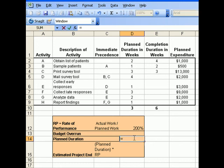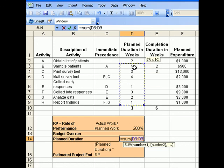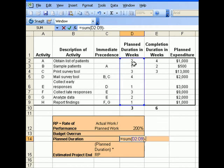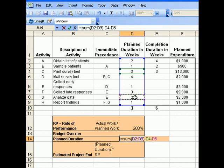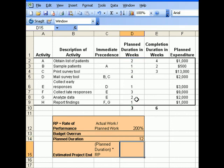We'll take the sum of all the number of weeks for these activities, and subtract activity C, which does not fall in the critical path, and also the number of weeks for activity G, which does not fall in the critical path as well. With that, we have a planned duration of 12 weeks for this project.